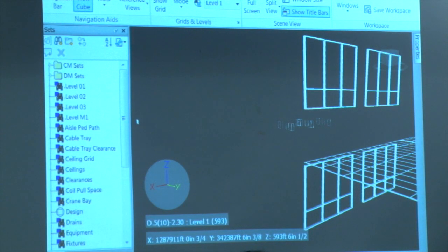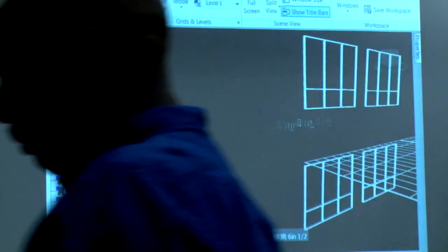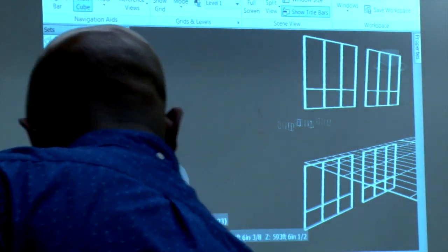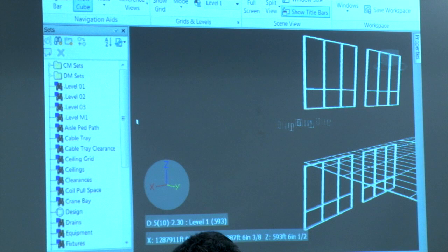If it hasn't already, is the technology going towards being able to use this out in the field as a mobile? Oh, we already do. There's a software called BIM 360 that lets us put it on tablets. And we have big kiosks on our site. It's basically a job box, but there's a screen and a computer in there, and we have Wi-Fi, so all the models are refreshed to it. And of course all of our total stations and survey instruments are loaded with these coordinates, so everything's tied together now. So I could essentially be out in the field, looking at a pipe that's going to run through, like a duct bank, and see, okay, is this pipe going to hit this duct bank, and direct the crew right then. Exactly.